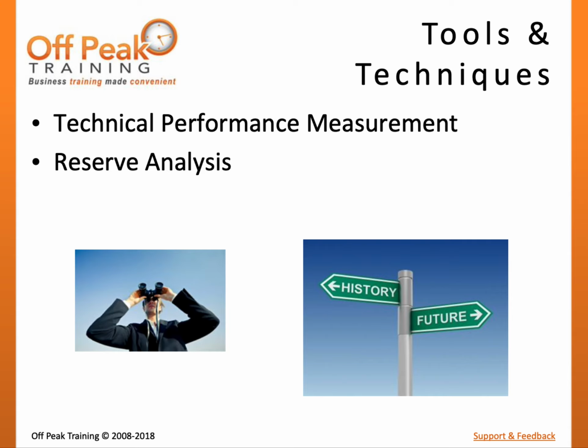Reserve analysis is the monitoring of the contingency reserves that have been incorporated into the schedule and cost performance baselines as a response to identified and accepted risks. Again, there is a strong overlap with the control schedule and control costs process. By monitoring the contingency reserves, the team can determine if the risk has actualized or not.